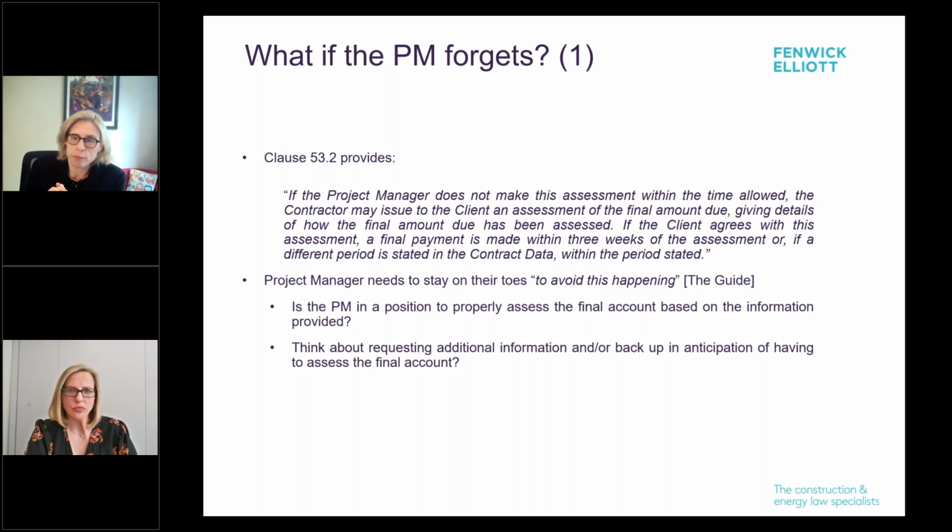But the questions raised by the final account process in the NEC and how it's drafted, and it's typical NEC drafting, there isn't any case law on it yet, and it's relatively loose because it's meant to be this common sense language. So the obvious one is: is the project manager in a position to properly assess the final account based on the information provided? Because actually there's no provision for you to put in your submission as the contractor within this process. Now, the savvy contractor will have been putting in their applications before the defect date happens, but once the defect date happens, the assessment period finishes.